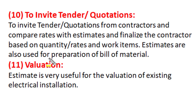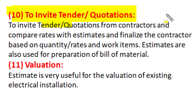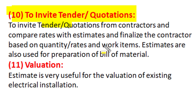The ultimate object of estimation is to invite tender or quotation for electrical installation work. The estimation is prepared by one department, which then invites tenders or quotations from other contractors and suppliers and compares the quoted rates with the estimate amount. With that comparison, both the quality of material to be supplied and workmanship to be performed can be checked, and rates can be compared to finalize contractors based on quality, rates, and work items. Estimates are also used to prepare bill of material for suppliers and contractors.